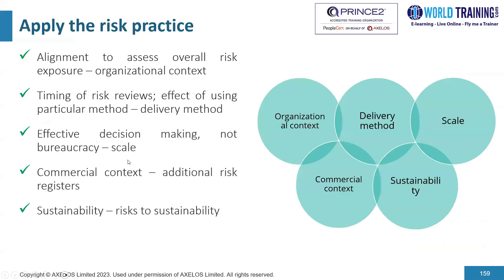In terms of how we apply the practice: in the context of the organization, we align the risk practice to the overall risk exposure. In the context of the delivery method, we agree on the timing of risk reviews and adopt practices accordingly. In terms of scale, we look into effective decision making and non-bureaucracy. In a commercial context, a supplier might maintain their own risk register and the customer their own, so we consider the possibility of additional risk registers. We may also look into risks pertaining to sustainability.